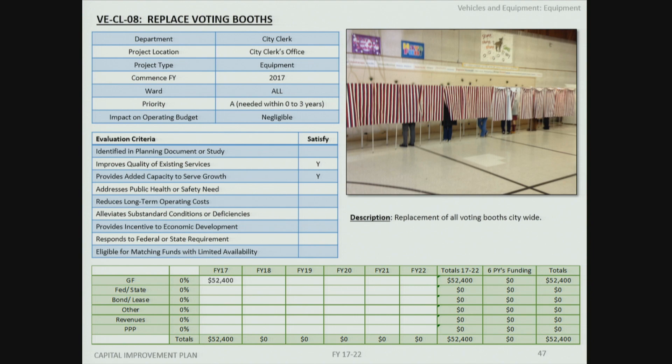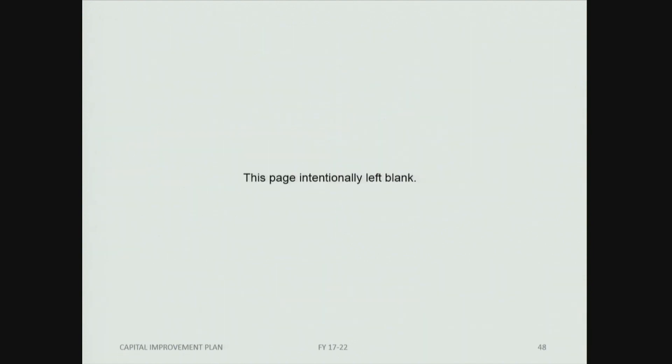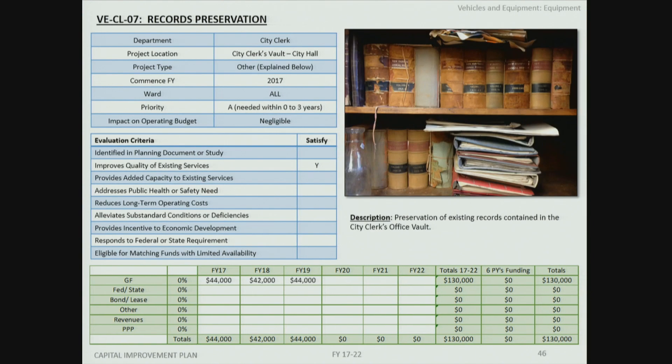The second project is records preservation: the first of a three-phase project for existing records contained in the office vault. The preservation process includes deacidification, mending and reinforcement of paper, re-sewing, rebinding, and archival-grade polyester encapsulation as appropriate.